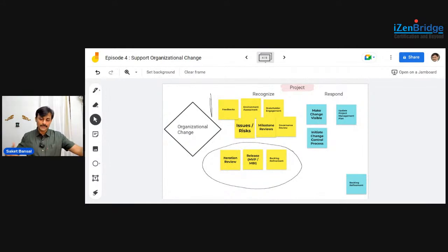Again, I may do a detailed impact analysis, present the idea, and show the impact of this particular change on our deliverable. So we should show what is the impact of changing by way of cost. At the same time, we also need to show the impact of changing as a part of benefit. And we also need to show the cost of not changing as a part of opportunity loss. So I may do a different kind of analysis to show the benefits as well as the cost attached to that particular change in a predictive way of working.